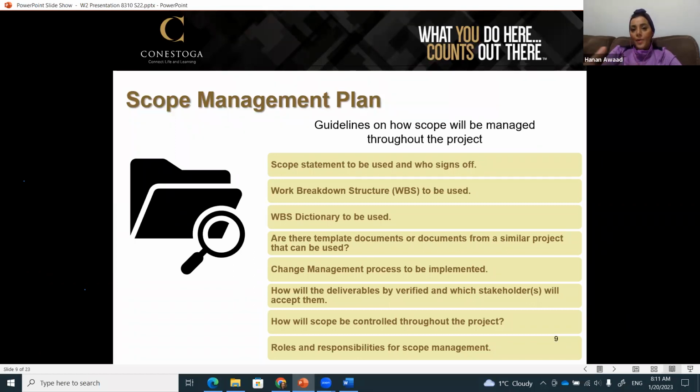For example, in the website example that we are working on, we will collect payment using only 2 methods. So these 2 methods will be specified in the scope. If the company uses other methods, these other methods will be excluded from the scope.